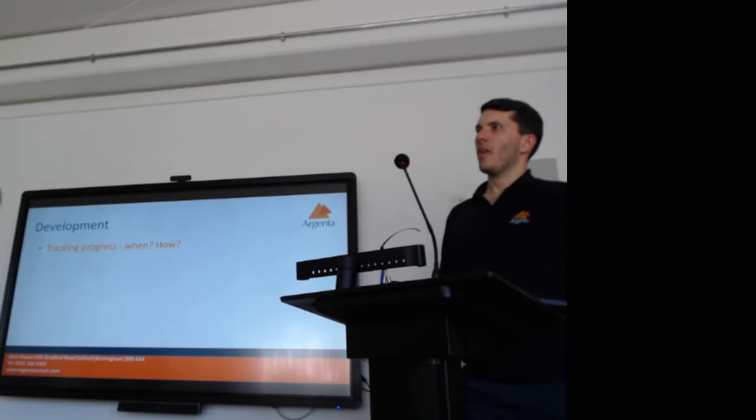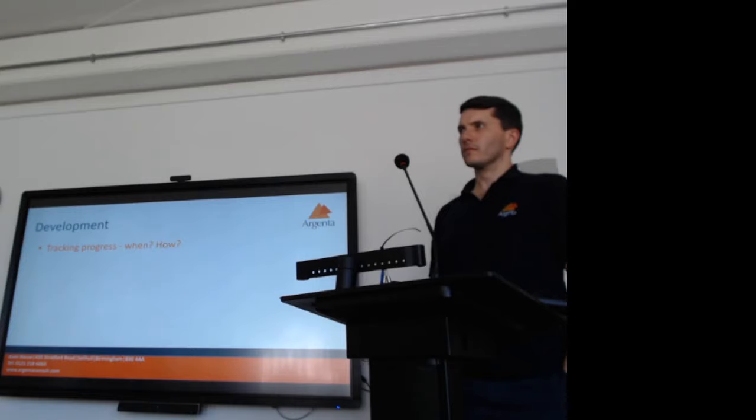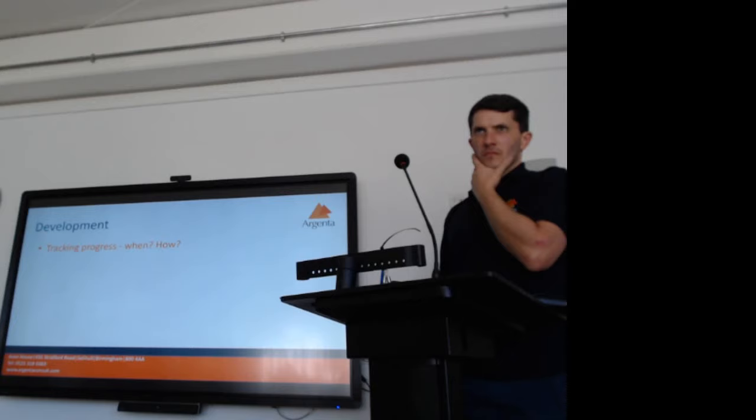What I found is I was trying to track everything in JIRA, and actually it's very good for the very detailed work, and it's not very good for the overview. So what I really want to end up doing is having a better tool for the overview level, and then you can keep JIRA as a more detailed tool. We're just trying to crack that because we use Microsoft Project for the standard project, and that's broken down to electronics, software, mechanical, testing, the process development, the tooling and all that.